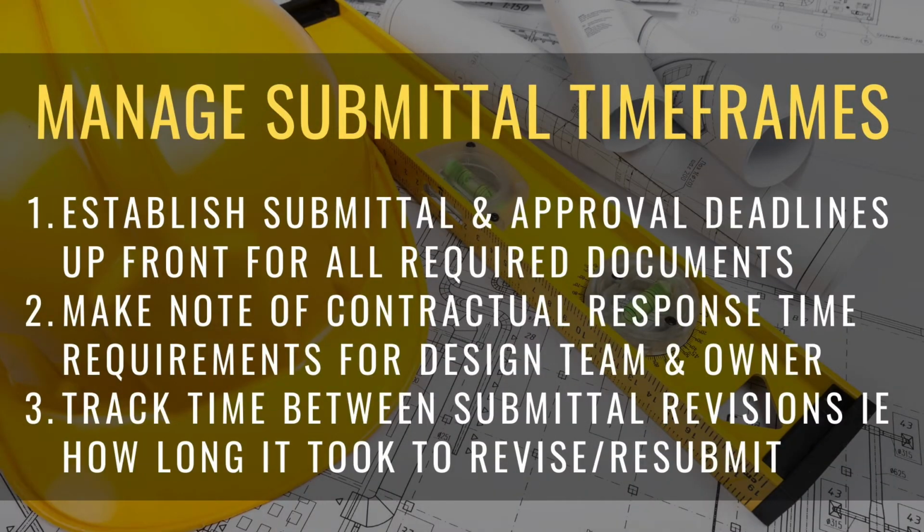Another good practice is to track the time between submittals as well. If, for example, a set of drawings is being revised, it's good to know how long it took to get that new set of drawings turned in. When it takes a long time to receive a revised document, the project as a whole feels the impact.